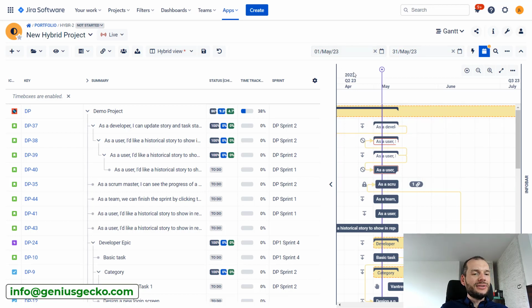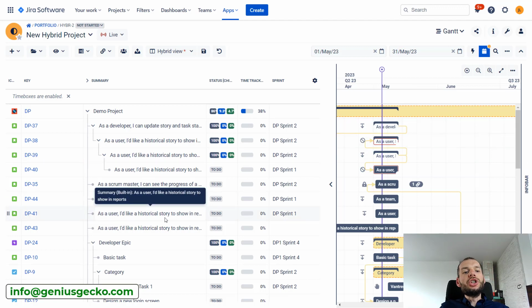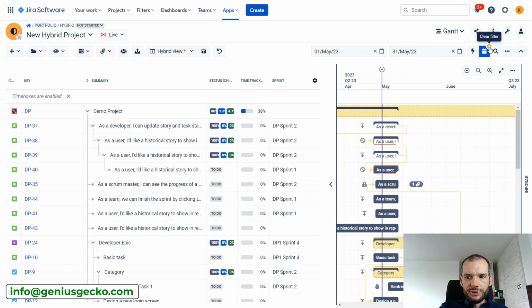So although I do not use it very often, I see that for larger projects, it is very useful to narrow down this search, because very often at the moment we are just interested in something that is like a month or 2 months from now, to 2 months in the future. Maybe we can take in 1 week from the past, and a lot of issues that are planned for later will just disappear. We can focus on the nearest future because this usually requires the most attention. So although pretty simple, also useful.